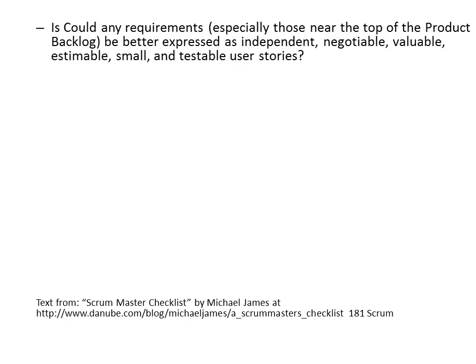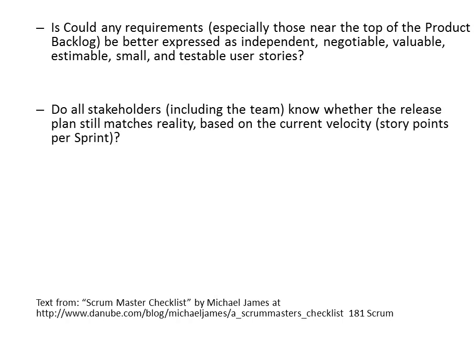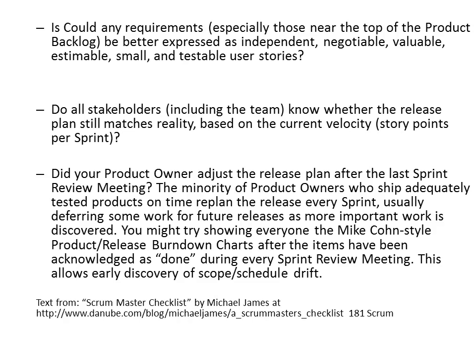Some of the other items would be to check the health of the requirements, the user stories, if they are being done right, if they are following the standard story writing criteria, if the stakeholders are informed about the progress, how the release date would be achievable or not with the current velocity, and if the product owner is basically using the inputs from the existing iterations and updating the product backlog accordingly.